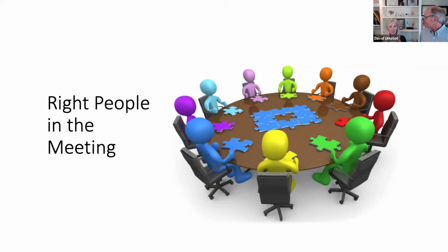They kept saying, well, I don't feel comfortable, I don't understand it, and they just wouldn't make those commitments. So the team really had to work hard to understand how they could move forward with this person not making the commitments. So one countermeasure for this, particularly for the kickoffs for the milestone plan and the first phase pull, is to make certain not only do you have your superintendents and foremen there, but also the project managers who control the resources. Because if they understand what their commitments are, then they're really making a commitment on behalf of the organization. And the foremen and superintendents, depending on the situation, will feel a lot more confident in what they're doing or asking for what they need in order to meet those commitments.